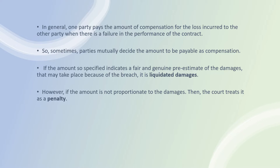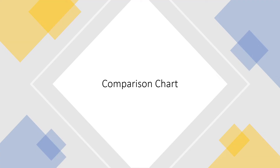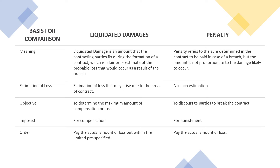In general, one party pays the amount of compensation for the loss incurred to the other party when there is a failure in the performance of the contract. Sometimes parties mutually decide the amount to be payable as compensation. If the amount specified indicates a fair and genuine pre-estimate of the damages that may take place because of the breach, it is called liquidated damages. However, if the amount is not proportionate to the damages, the court treats it as a penalty.